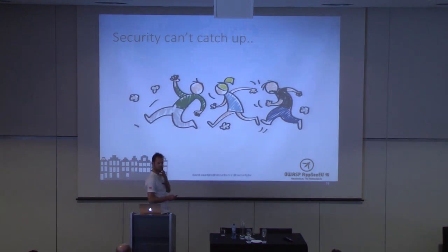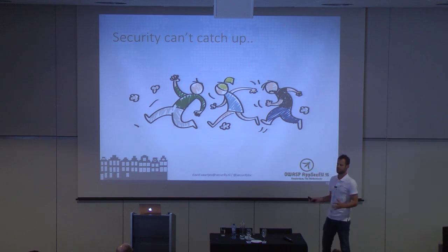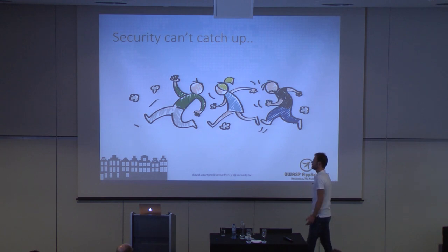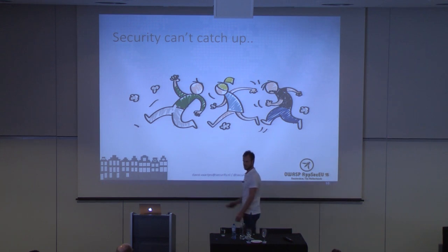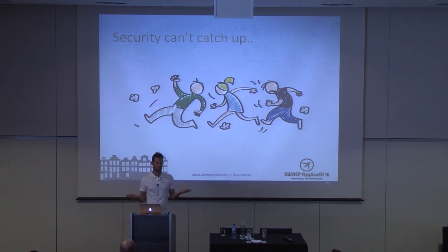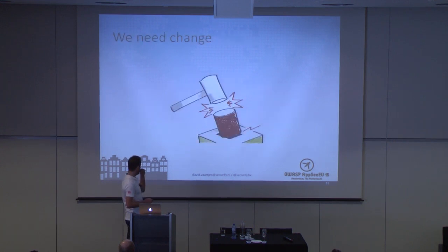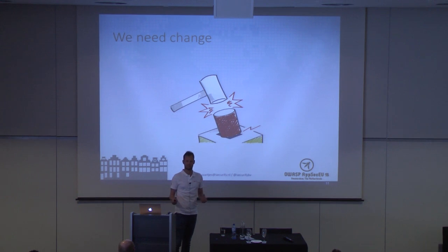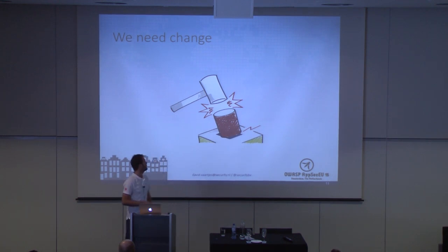So this is frustrating for software developers, but it's also frustrating for security teams. Imagine yourself being part of a security team with over 50 software development teams in your organization, which in their waterfall time did about a release each 3 or 4 months. And now all these teams are requesting sign-off every 3 or 4 weeks. Trust me, you will completely lose it, and you somehow will start giving in on quality, because you can never keep up with that. So there's frustration, I think, on both sides. Probably it goes without saying, but waterfall security testing and agile development, if you want to do real agile, just ship right after you close the sprints, aren't really friends.